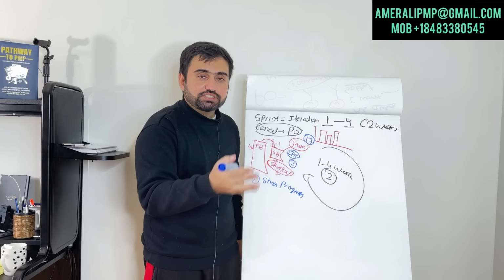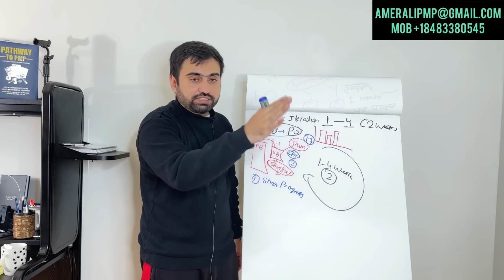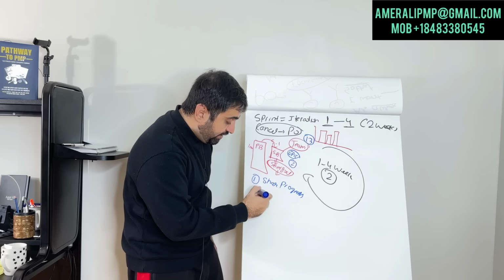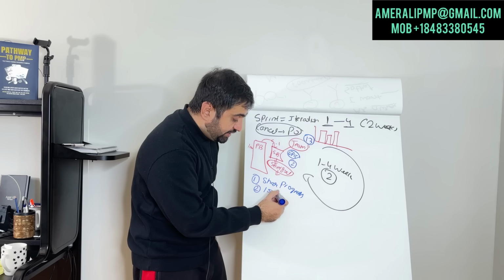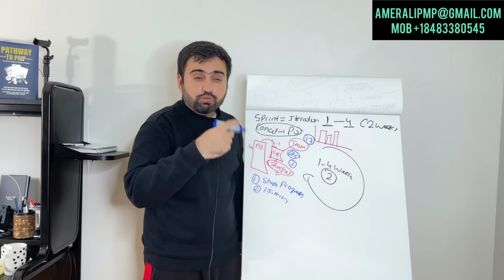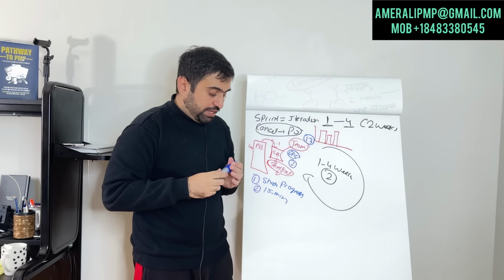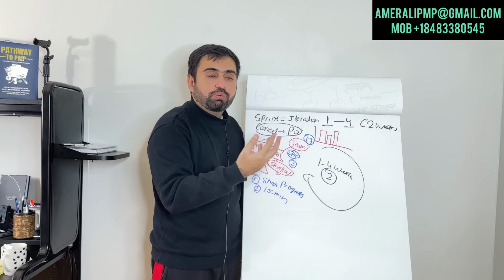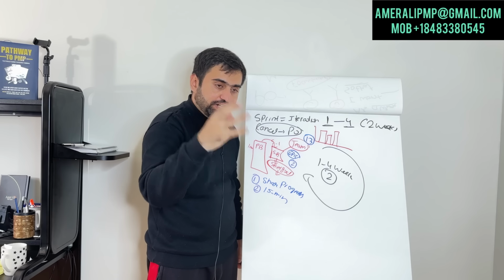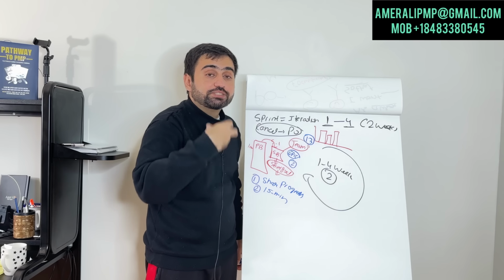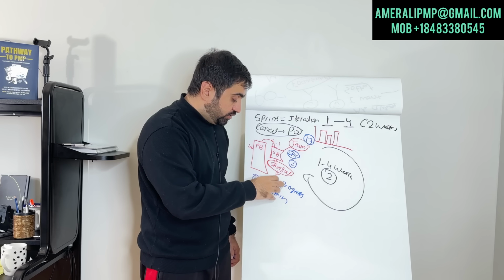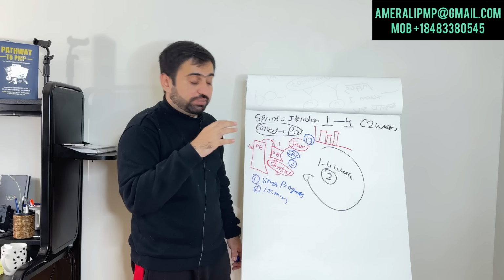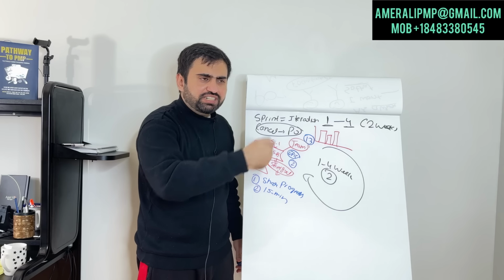The Scrum Master is there as a facilitator. He is asking each person, or they are sharing the progress, and he is making sure that this ends in 15 minutes. It happens at the same time, same location. We prefer to have a co-located team. That is one of the concepts in Agile. Even if the team is distributed globally, you have one kickoff meeting where they come, sit together, and we explain everything to them. So they come to us, we share the progress, 15 minutes, same time, same location. They discuss what they have.